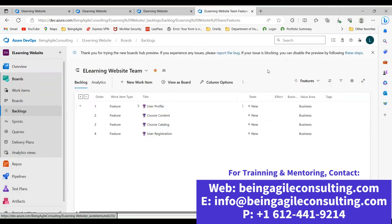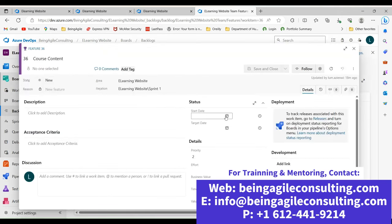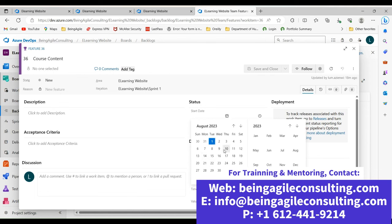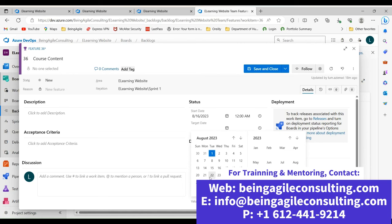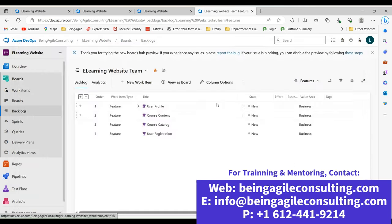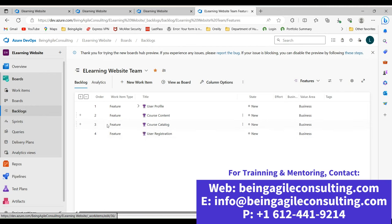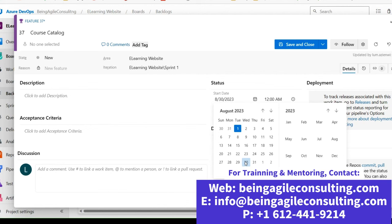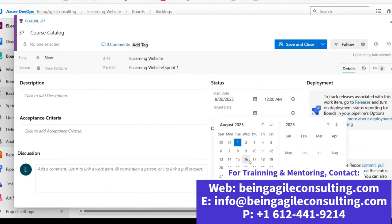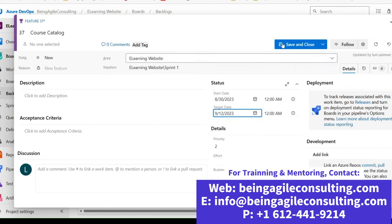Save and close and see what changes. Let's also set a plan for the second feature. Click Course Content and set a plan. We hope to deliver this feature in the second sprint, starting from the 16th all the way to the 29th. Save and close. Let's also set for the third feature — we hope to deliver this one starting the 30th of August, which will be the third sprint, and deliver it by the 12th of September. Save and close.